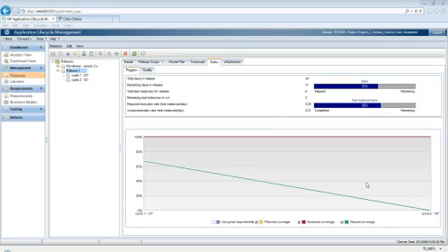in trouble. But this is how release management works, and it's very important that you use it because it'll give you this particular view that you can take back to the project manager and not come stuck when project managers are asking you where are you with your execution, and mostly you're going to say 25%, 50%, 75%. When you see these numbers, you know that they're not actually accurate. But when you do look at Quality Center and you see, hey, I'm actually at 63% with 66% of instance runs, then that's exactly where I am. Okay, there's no lying behind it.